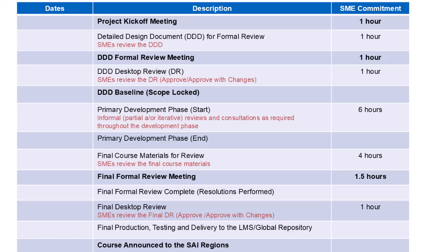If it was a big course and they're reviewing all the modules at once, we set it at 5 days. If it was a smaller course and not as much content, then we would schedule it 3 days. So the course review always happened 3 to 5 days after the invite was sent out. That formal review meeting you schedule for 90 minutes because it's reviewing every module. And they're going to be providing you feedback.